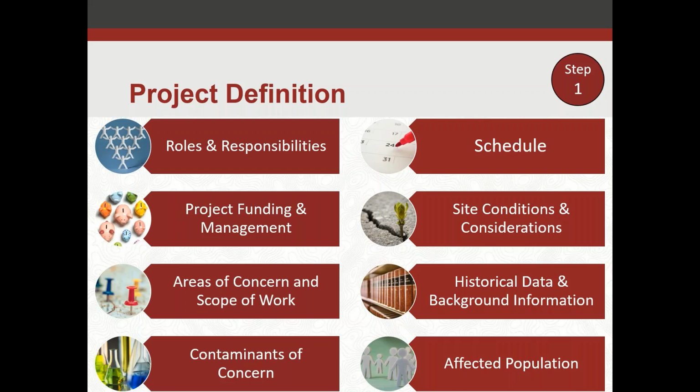For instance, if you're dealing with a K through 12 school, especially 6 years and under, you're going to have all the most stringent requirements for asbestos remediation, and you have the most stringent requirements for lead-based paint abatement.